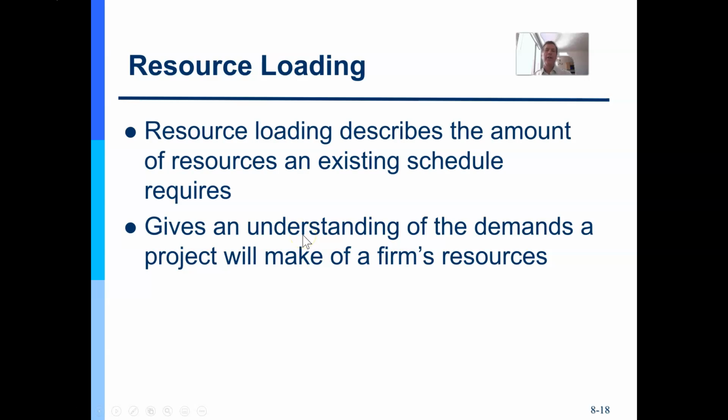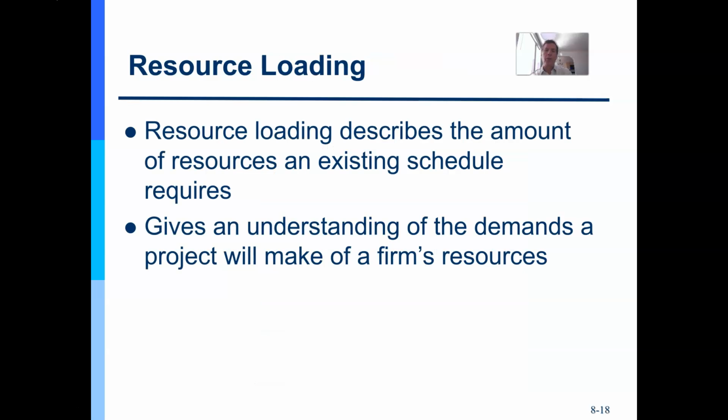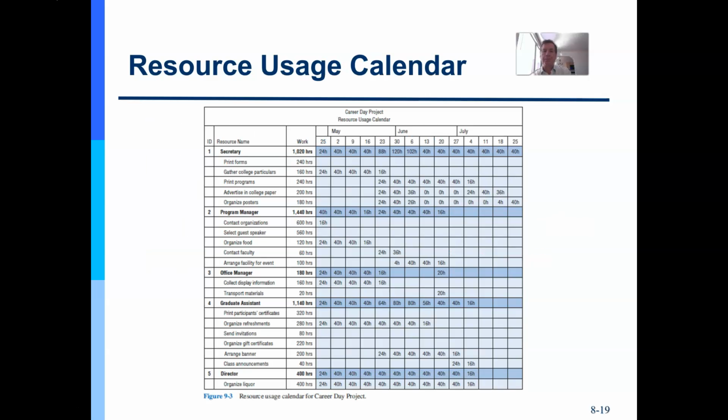Okay. Now I could do resource loading or resource leveling, another term that's sometimes used. They're similar but not exact. But resource loading describes how many resources I'm going to need at any given time. So if I have all of my engineers loaded up front in my project, I probably want to smooth that out because it increases the likelihood that I'll have engineers available when I need them, for example.